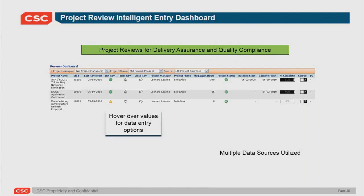This dashboard also serves as a great BI tool, so you can do a lot of filtering, because you can't review 6,000+ projects. It's not possible. So we built a very friendly dashboard that would allow you to prioritize what's important. Maybe we don't review them all, but maybe you review above a threshold of cost or price or significance of priority to the customer, et cetera.